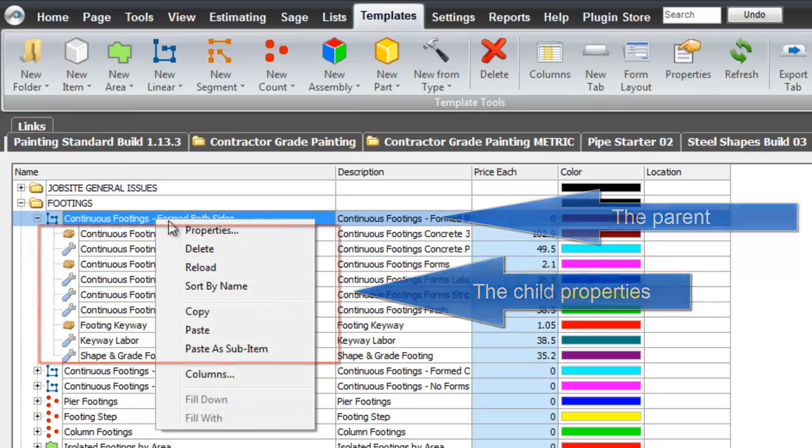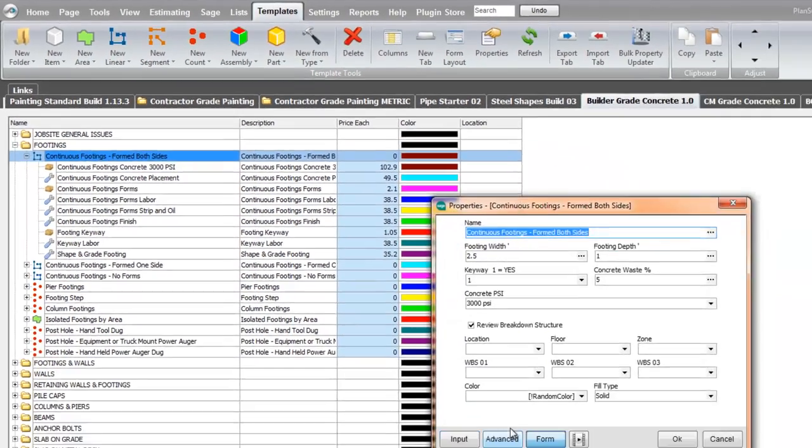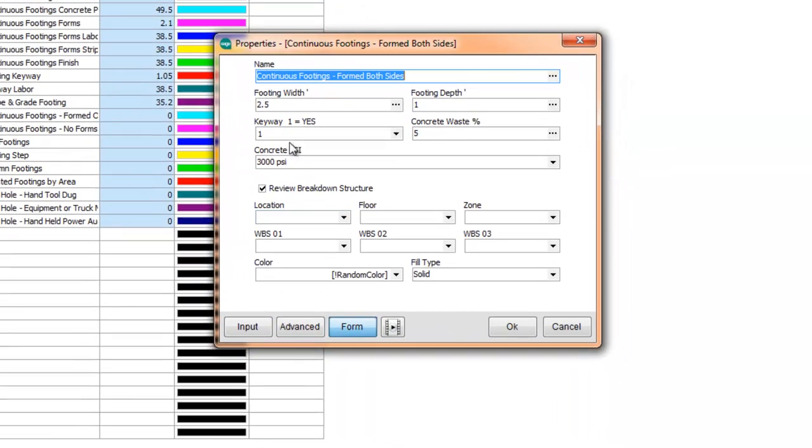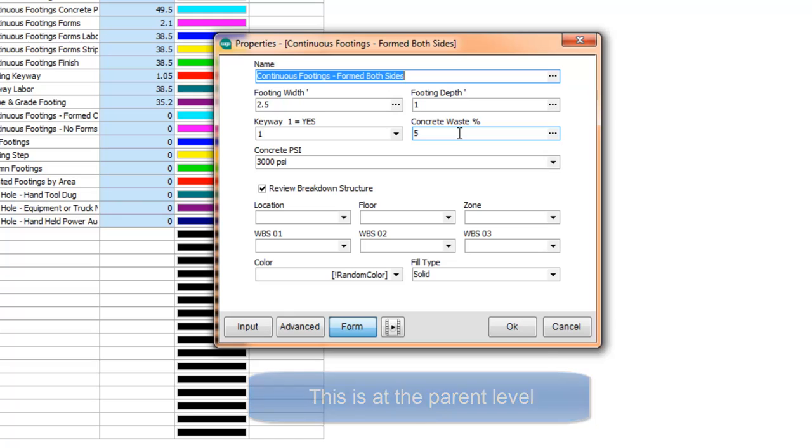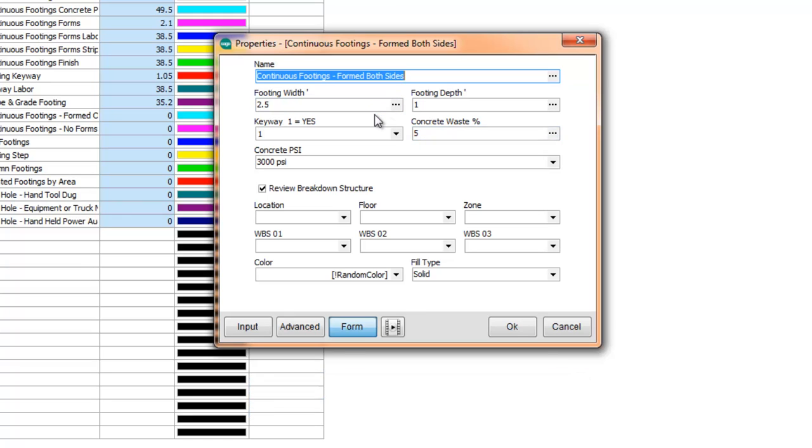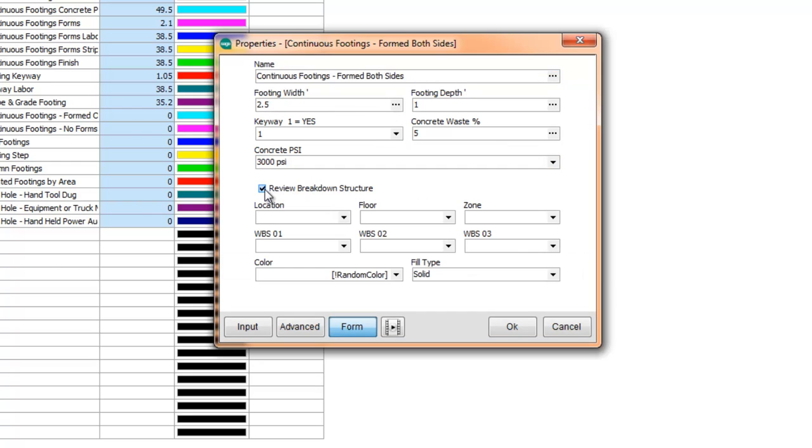At the parent level we have, as you've seen in the form, the dimensions: the width, the depth, the keyway, the waste. There's no length here because we're taking off the linear when we do our takeoff. Here's the concrete PSI. And then we have the breakdown structure.